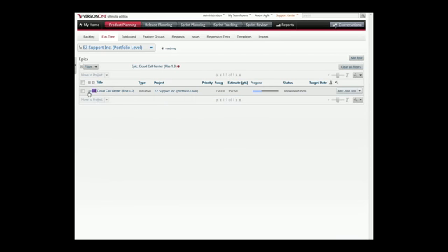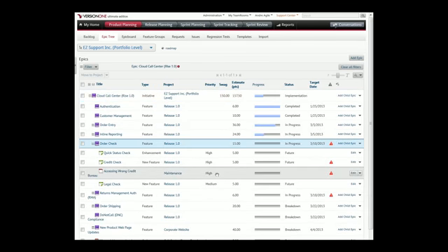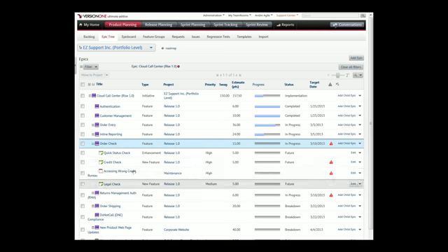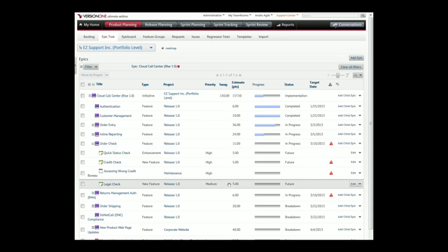So I'm going to take a look at Cloud Call Center, and as I go in here and look at what's been done already, I want to point out a couple of things that Mike brought up. The first is that I've got a feature for order check here, and the feature has several stories that have been identified, and then I can start using the priority field on the stories to delineate what are the items that really are part of my MMF versus the items that are more nice-to-haves.